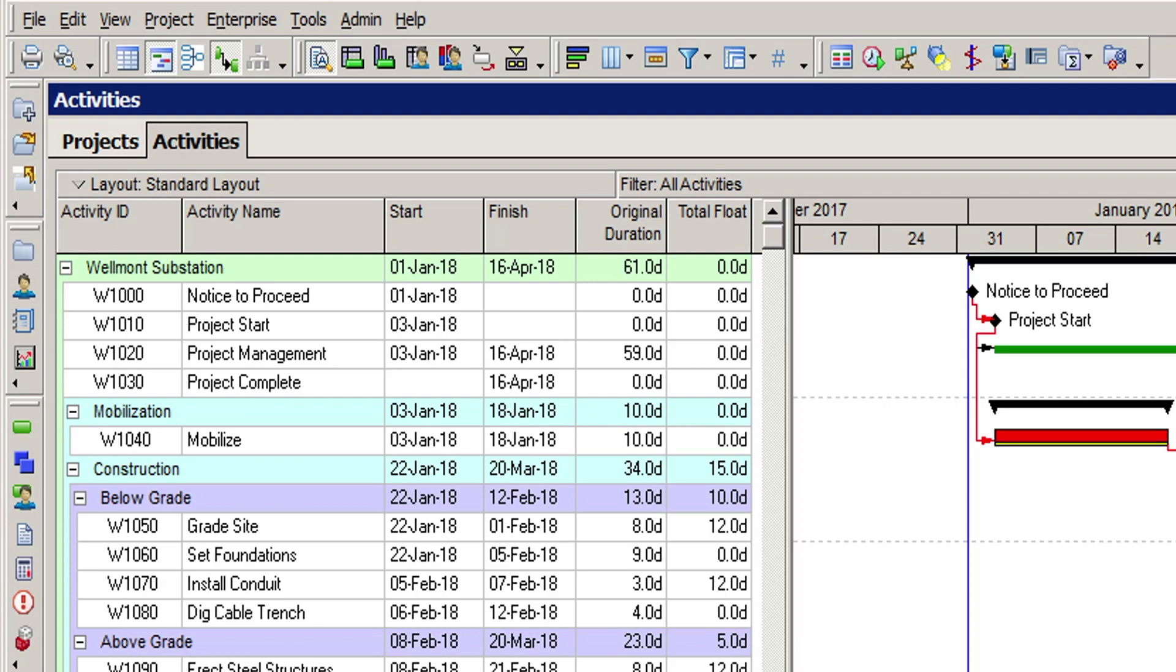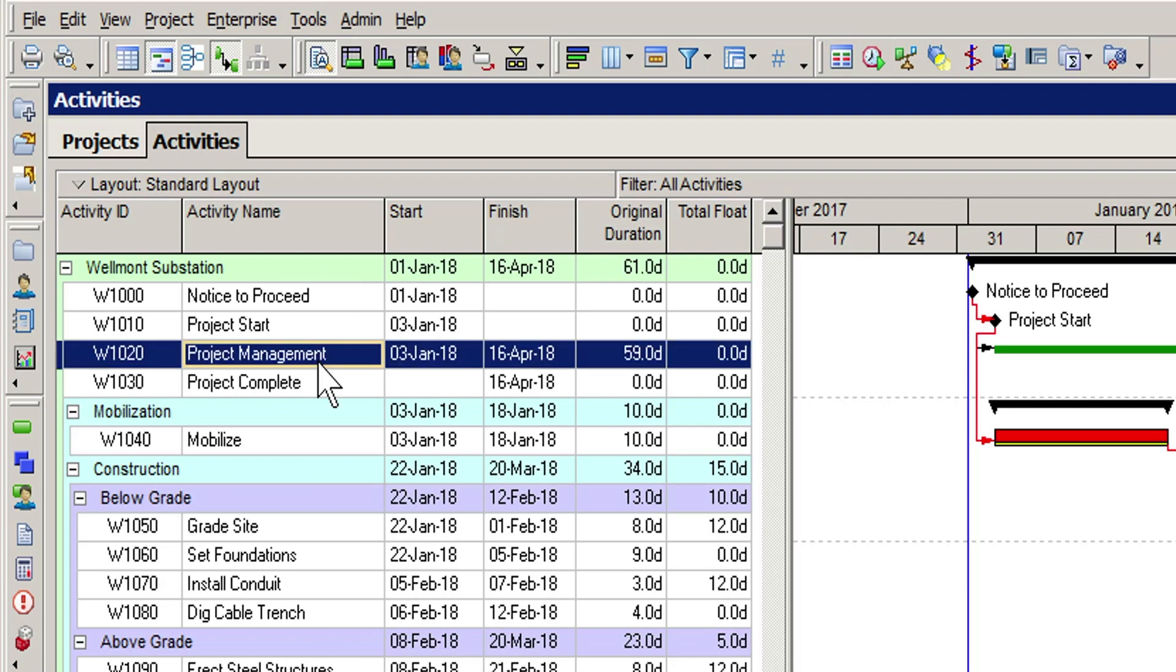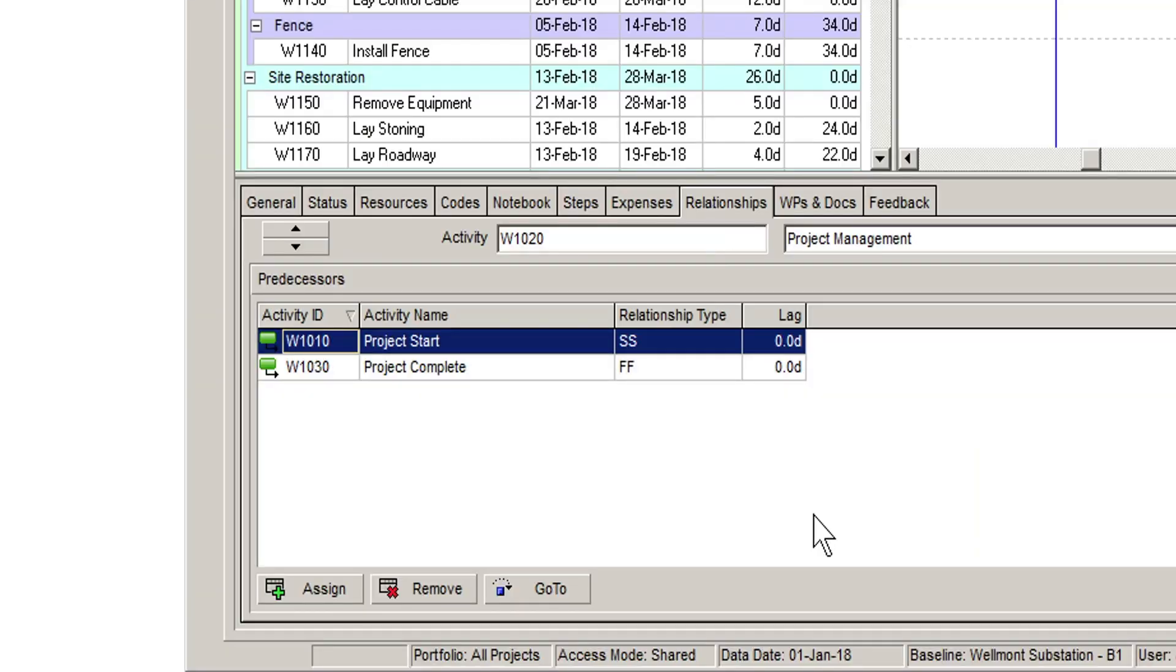In this case, project management needs to continue for the entire duration of the project. So, the activity has been linked to the project start and project finish milestones, respectively. To create the resource assignment, we select the project management activity.